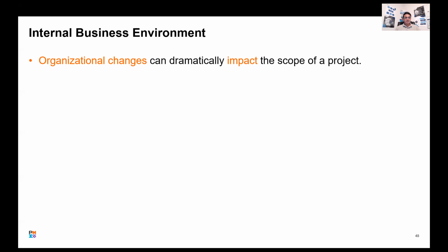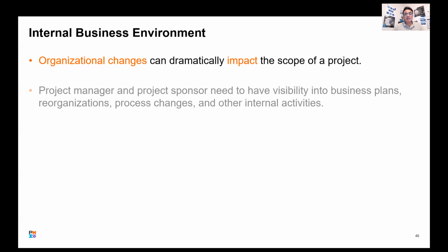Okay, who can tell me? Carlo, do you want to go? Yeah, the world is changing. Competition is always changing as well, and you need to evolve. Yeah, that's right. Okay, but let's say you're doing a project, and you have a sponsor who's keen to help your project, and then suddenly the sponsor resigns. Now you have a situation with a sponsor who's not interested in it. So it's going to impact the scope of the project. Your project may get canceled. There are a lot of factors, right?